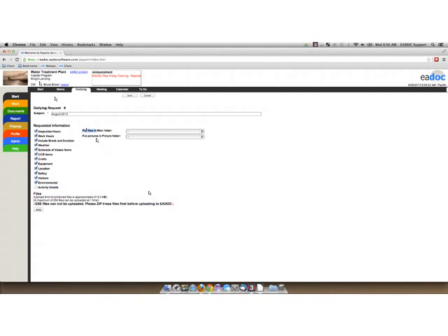You also have the ability to put files into the miscellaneous folder. What that does is it duplicates it underneath the Documents tab and stores it in the folder you select. So in this case, I'm going to go with Daily Log Reference Documents. Anything that's a non-picture document is going to get filed under the Miscellaneous tab and underneath that folder. Any pictures that I attach are going to get duplicated in the folder that I select here, so we're going to go with Contractor Photos. And keep in mind that to get folders to appear in these drop-downs, you actually have to add them to the Document tab, either Miscellaneous or Picture. Once they're in that tab, you would be able to select them in the drop-down.